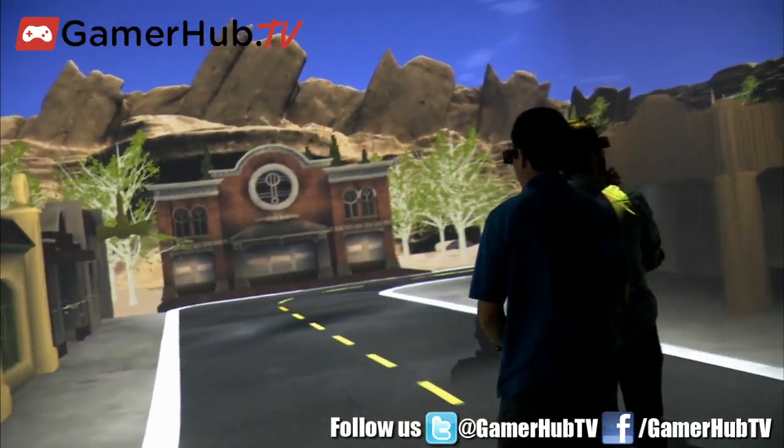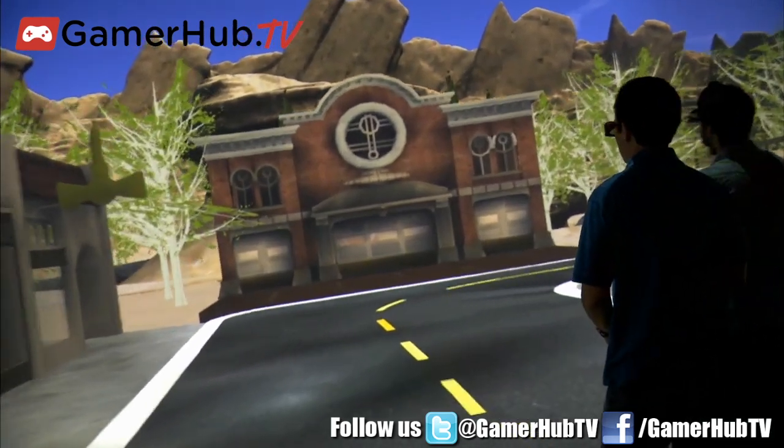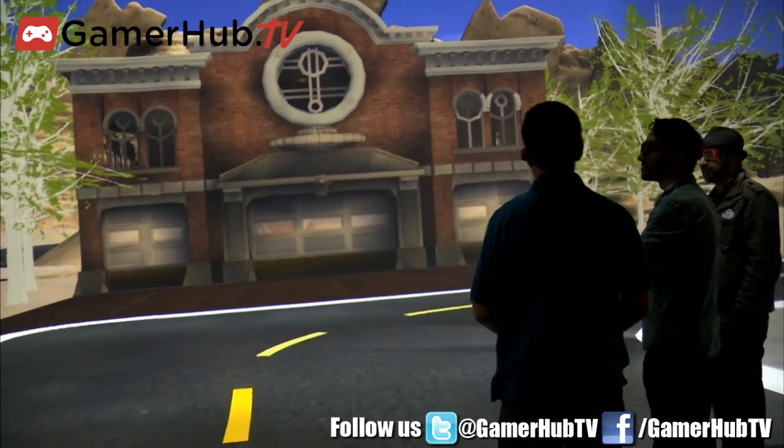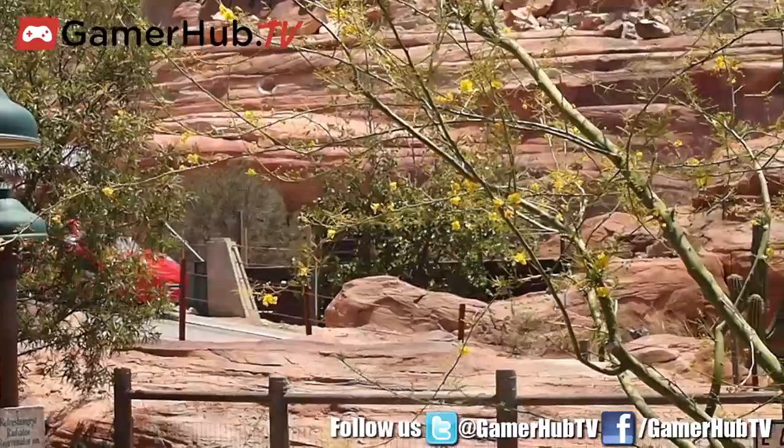We also use the tools for design coordination. Basically, we'll model our mechanical, our electrical, our structural, our architecture in 3D. And the things that used to haunt us, like, wow, that brace goes through a doorway, we're able to tackle those and get them out of the way. So when we get to our build part, we feel comfortable that the design is completely coordinated.